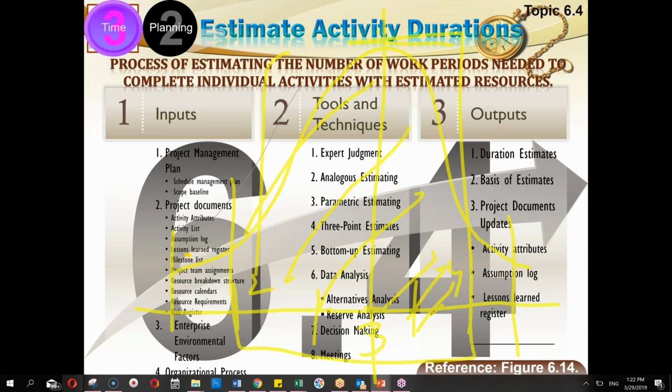This is the mean of all of these. Then I have taken the pessimist and the optimist value. I've given 1 weightage to them, 4 weightages to this, and 1 weightage to this. So 3 will be increased to 3.83. And the total number of deviations would be between 1 and 10. The difference between 1 and 10 is 9. And if I divide 9 into 6 parts, one deviation size would come out to be 1.5.